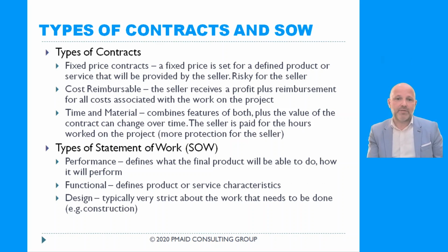On top of that, there are statements of work. What is the statement of work? That's the document that is typically signed after the contract between the buyer and the seller is already signed. And this document states what the vendor or the seller will be offering to the buyer, what type of work. This is a document that applies when the seller offers a service.